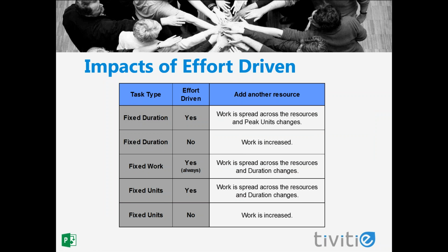If the flag is set to yes when an additional resource is added, the existing work hours will be spread across the resources. And then for fixed work and fixed duration tasks, the peak value is recalculated. For fixed units tasks, the duration changes. So you can think about the effort-driven flag as telling Project whether you want to spread the existing work across the resources, the existing resource plus what you're adding, or whether you want it to increase the work for this new resource.